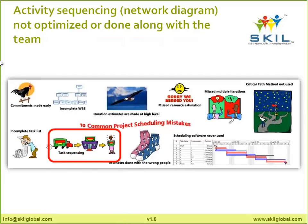The eighth mistake: activity sequencing not optimized. Sometimes we assume hard dependencies — Activity B cannot start until Activity A is completed. But your team and SMEs may identify that you can actually start some work before the predecessor is complete. This is the optimization I'm talking about — part of multiple iterations. Some things can go in parallel; some are true predecessors or successors. Optimizing this sequencing is critical and commonly missed.